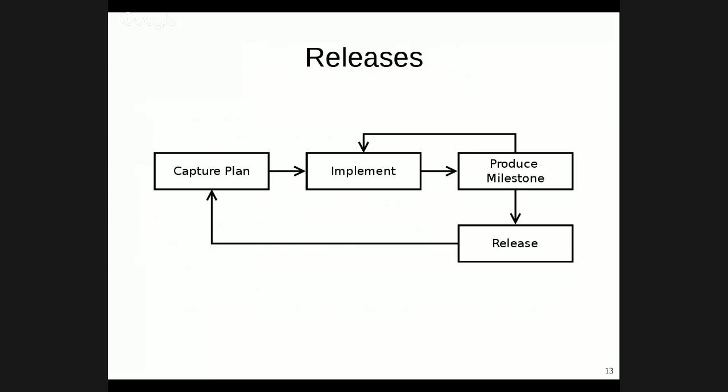So this can take all sorts of different forms, how it's documented. Minimally, having a bunch of bugs or issues open in your issue tracking system is the minimal thing that you can do to capture a plan. Having dates beside those, or version numbers beside some of those issues, when you are going to be addressing a particular issue, can be a minimal plan.